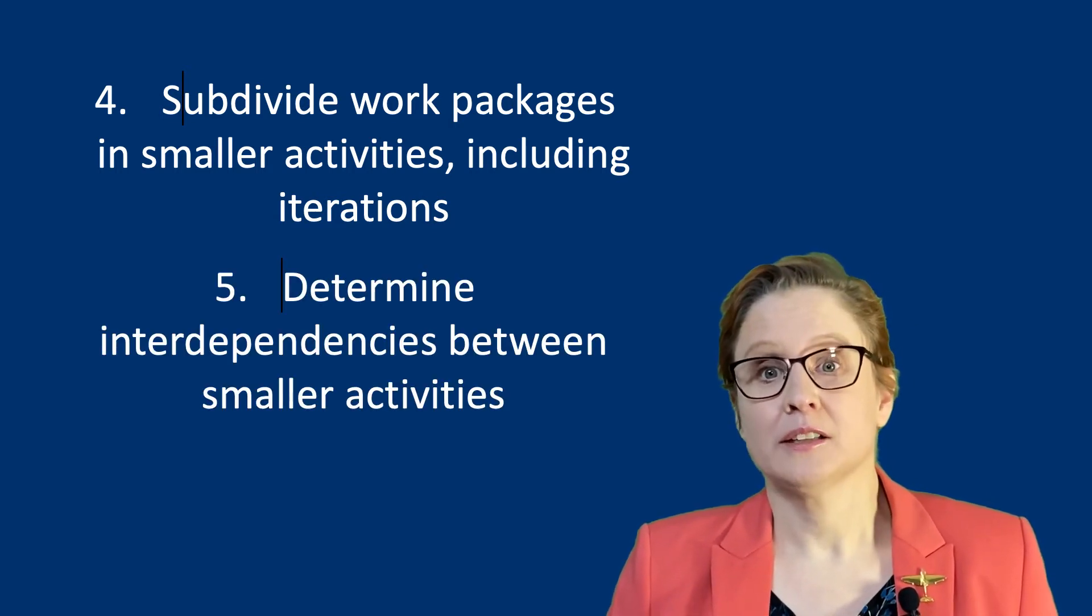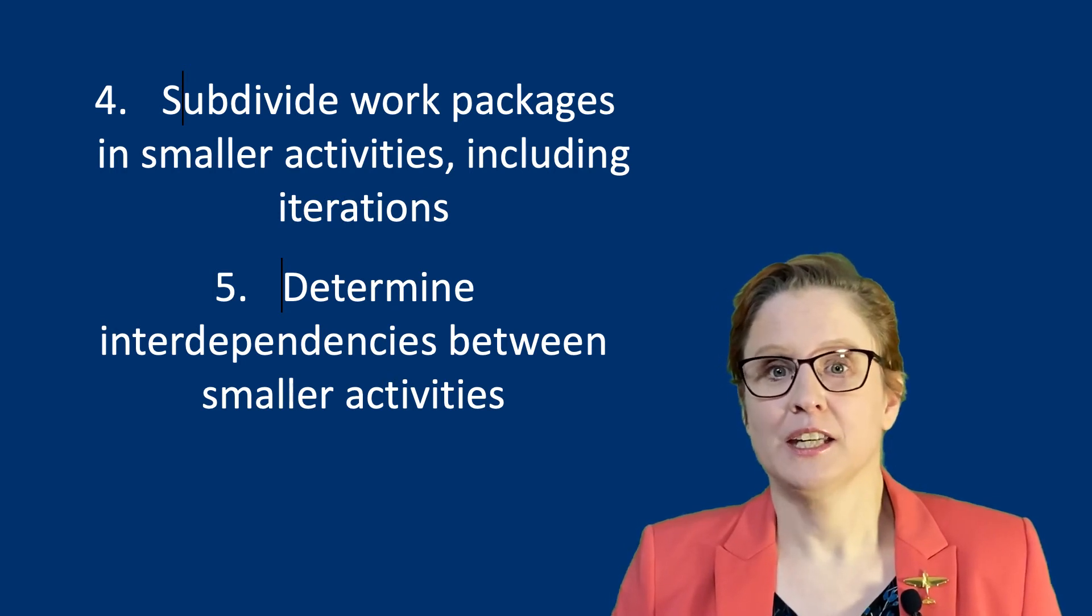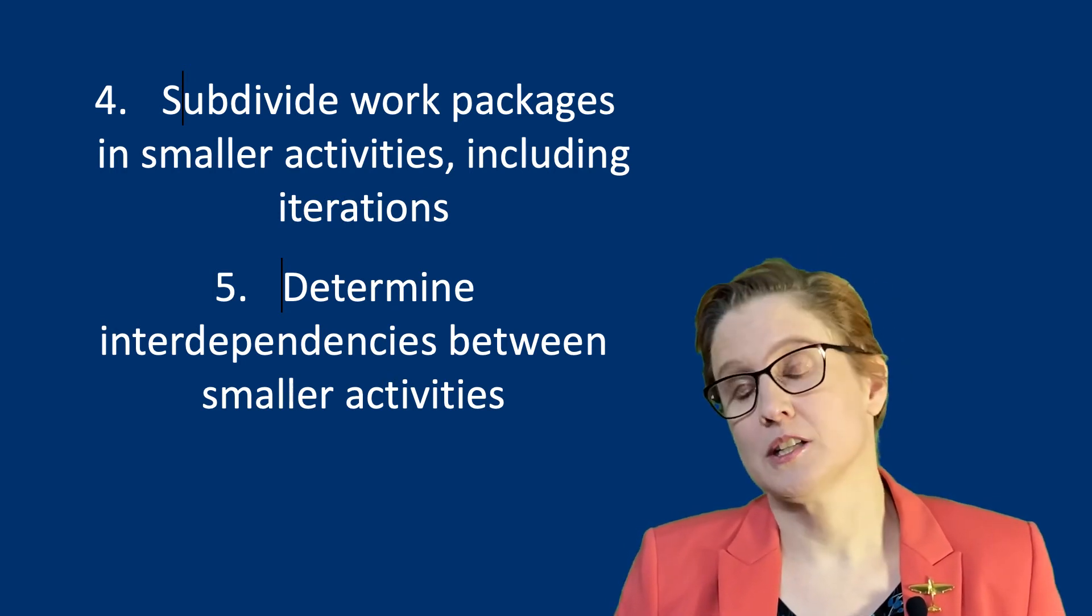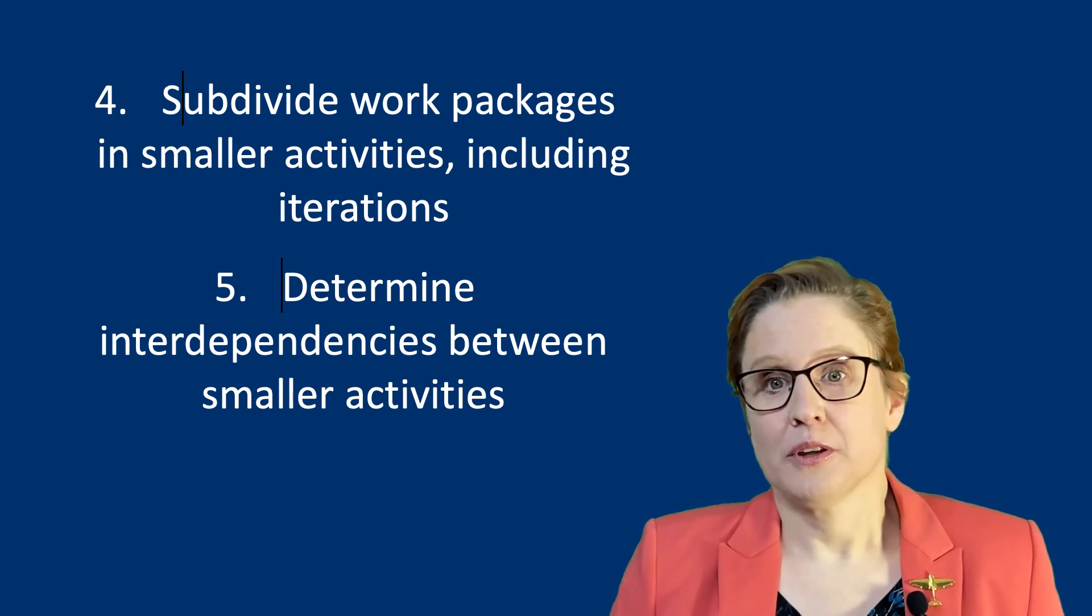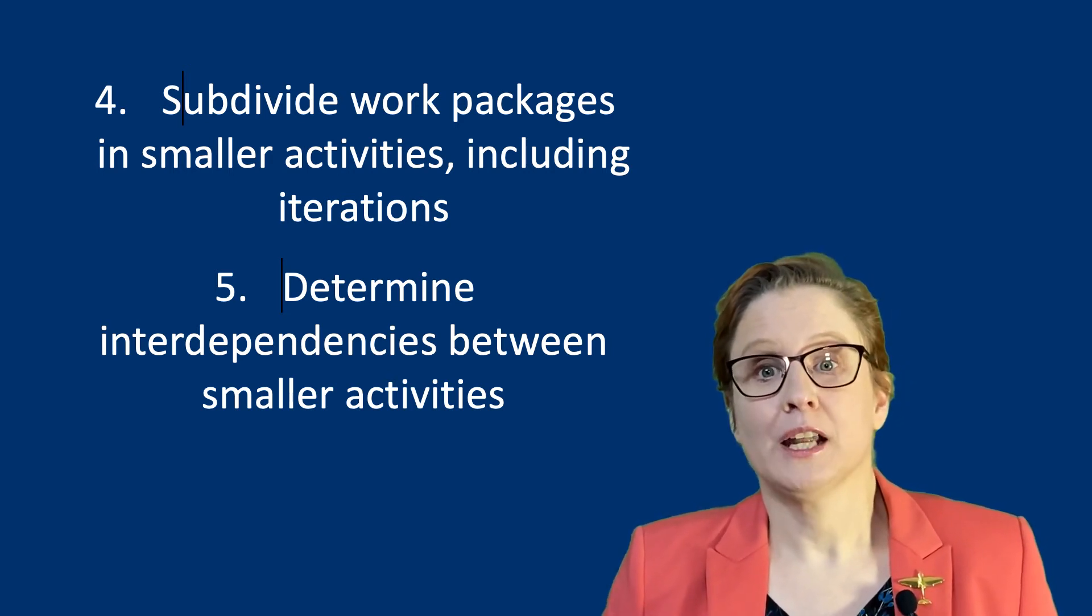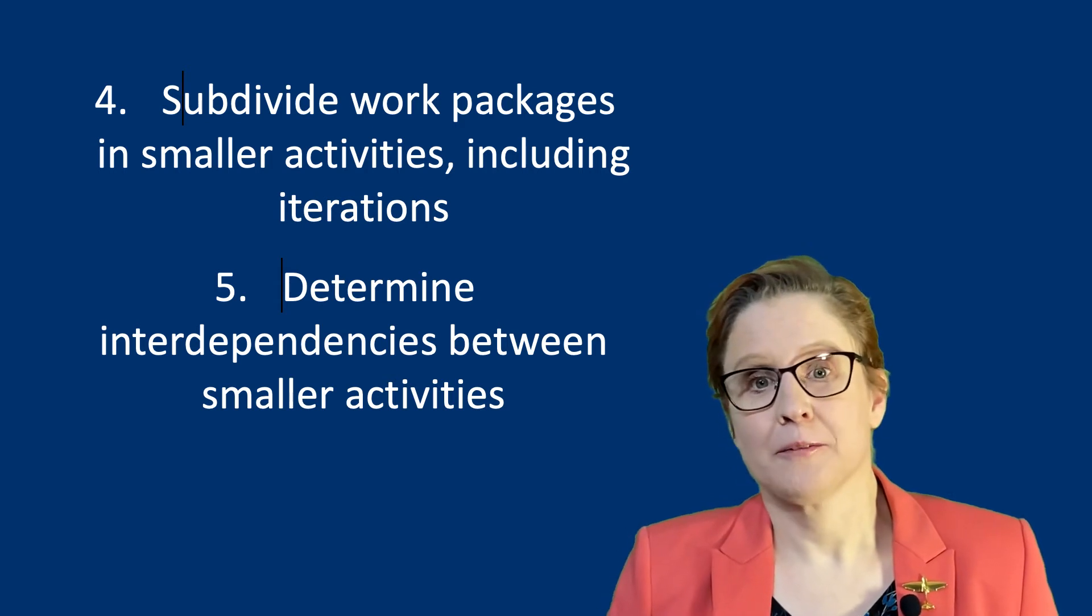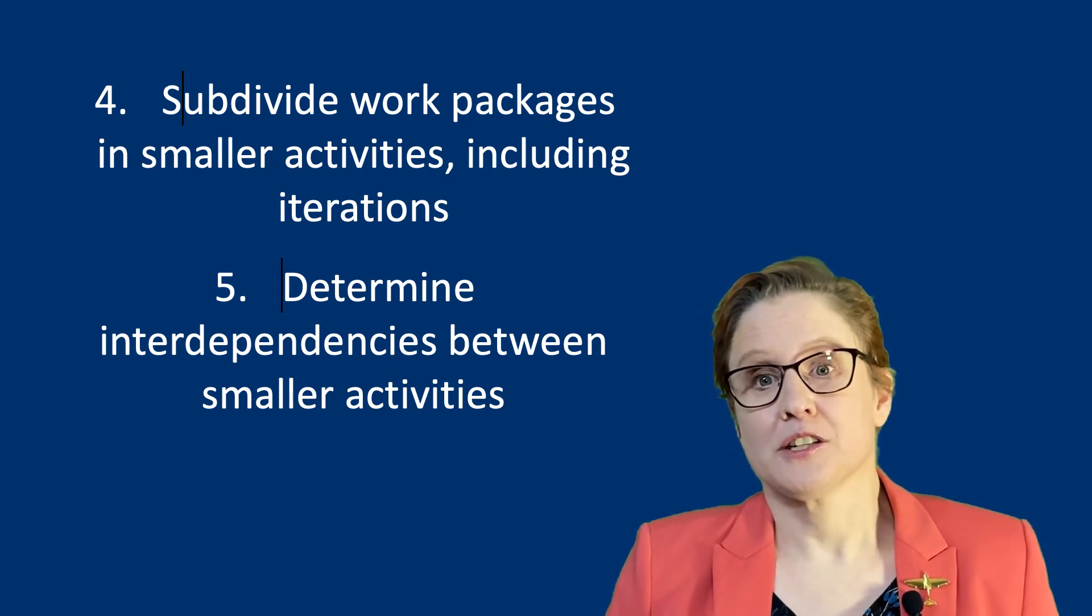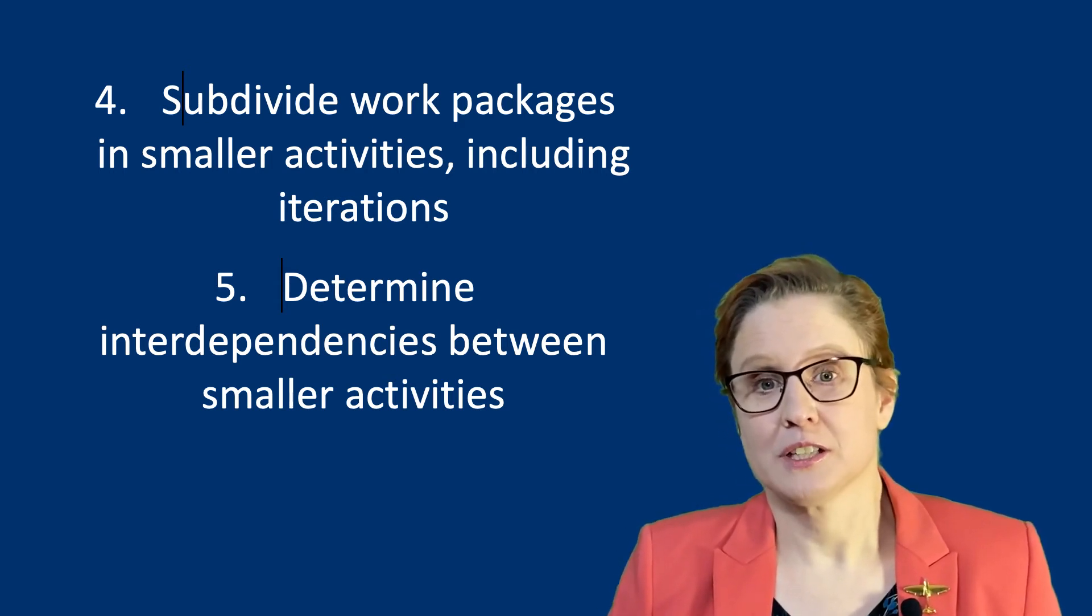When looking at activities, also take into account any iterations, as also seen in scientific methods. For instance, in your methods, design, or when you are coding, you will more than likely go through iterations after trialing. Try and pre-empt those iterations and include them in your list of activities.